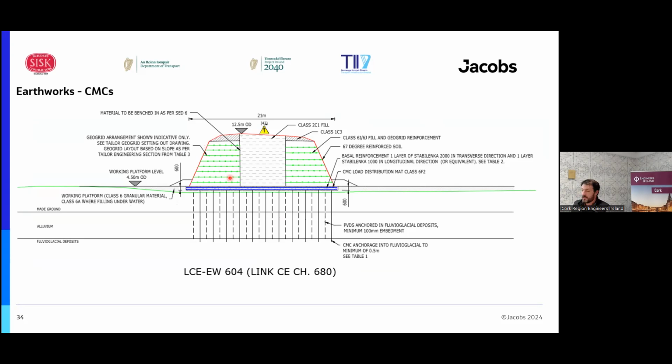So basically that is a geotextile retaining system, where there's just a geotextile wraparound mesh used with a Hessian on the outside and 200 mil of topsoil to grow a layer of vegetation on the outside, to stop weathering and for aesthetics for the future. That reduced down the footprint areas of the embankments by 17%. That had a knock-on effect on program, piling, earthworks, import materials, speed of construction, everything knocked on from that.